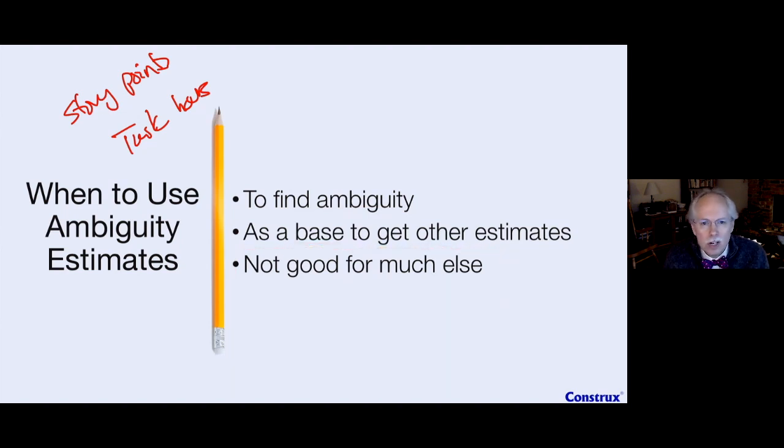A lot of organizations, I go in there and they say, Earl, our estimation is suffering really badly. And I'll say, tell me what's going on. And they say, well, we have our developers following Scrum techniques. We're using planning poker, and they poker a story, and we told them a story point equals 1 staff hour. But the technique of planning poker is really trying to drive the gut estimate ambiguity process, not the promise process. So they're using their guts, they're coming up with threes, and it's all getting messed up.